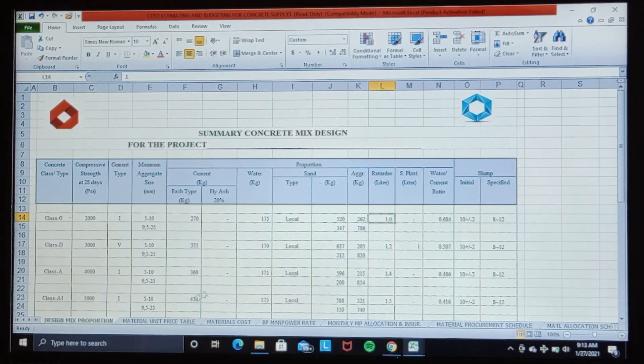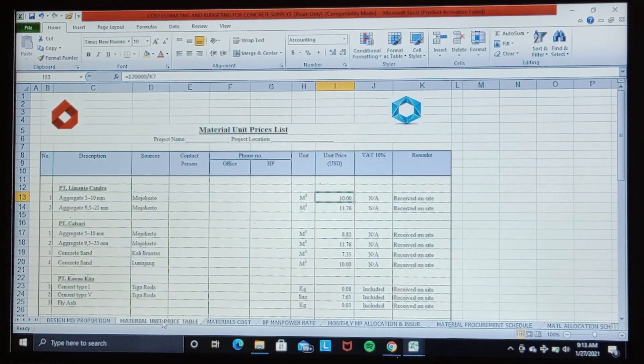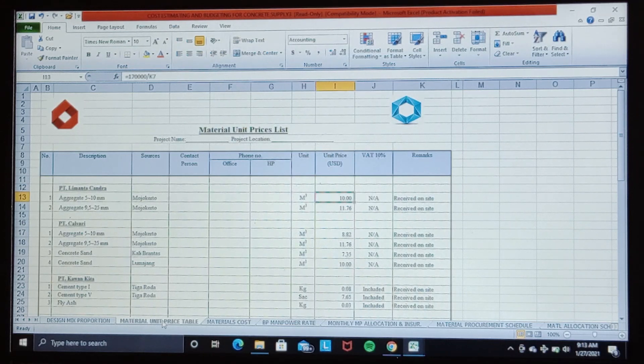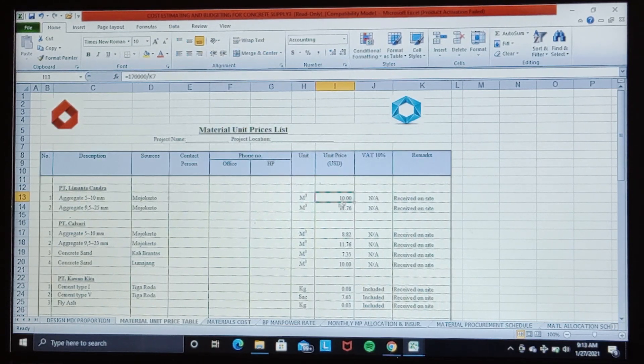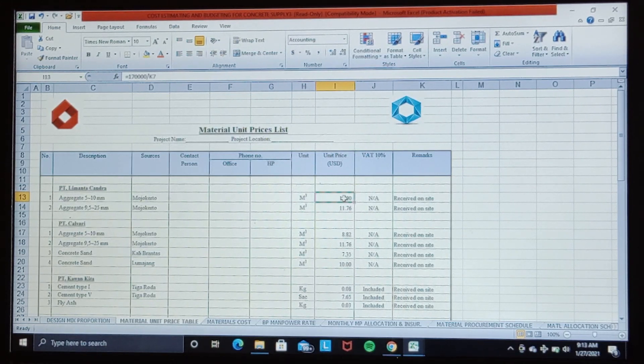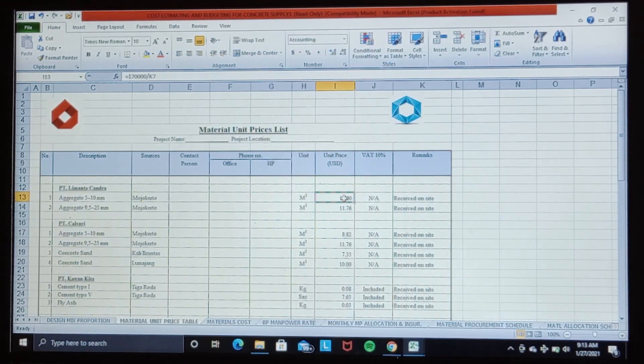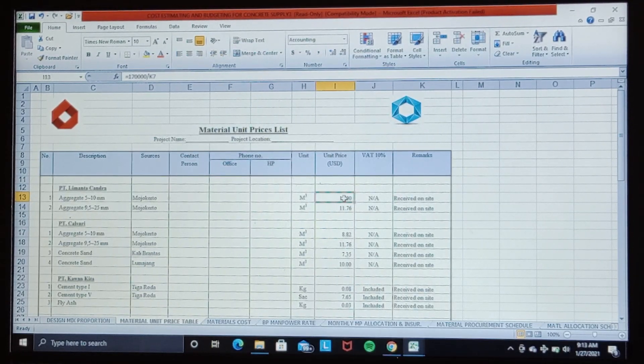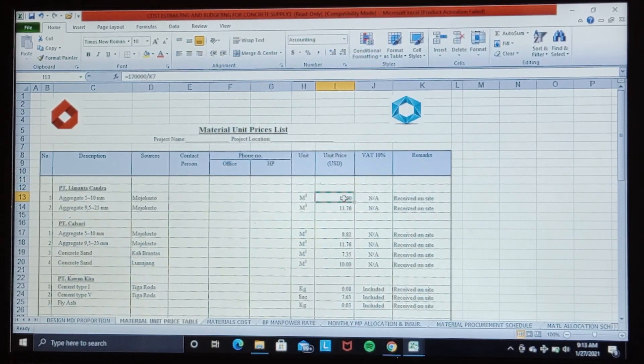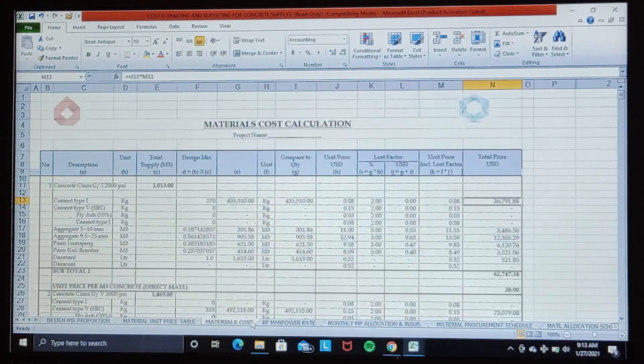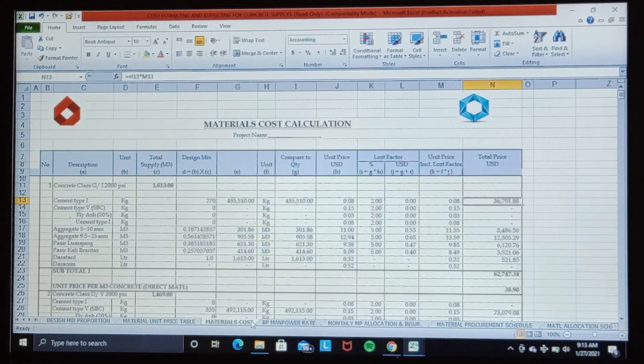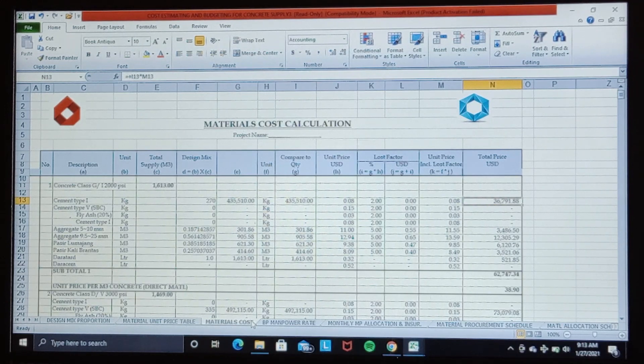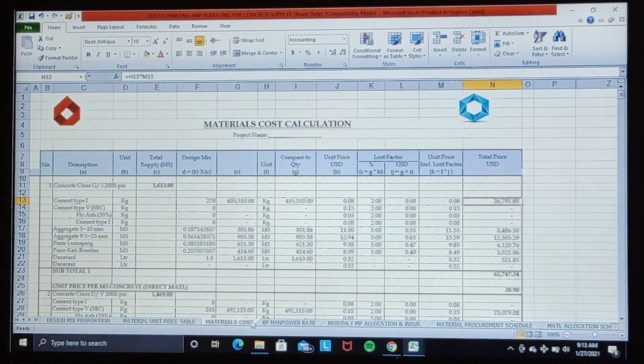Then we make a table for unit price of the material required, meaning that the unit price of material shall be on-site basis and also included tax and contingency cost to anticipate the material price increasing during the project. Next we calculate the material cost according to the total material required in the project.